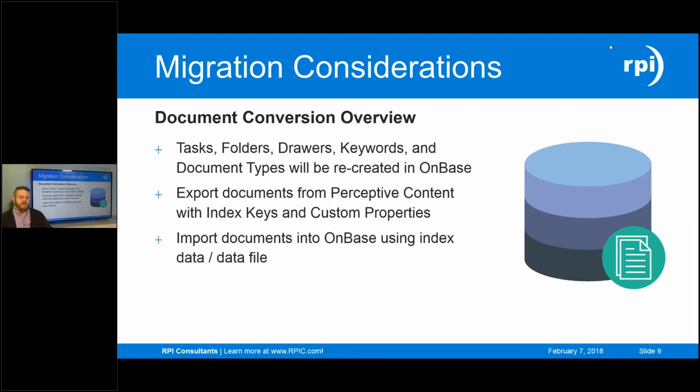It may be tempting to consider automating this step, and it is possible to use the various integration servers or web services to do an automatic export and import into another system. However, that's adding quite a bit in the way of technical risk to the document migration that may not be necessary.